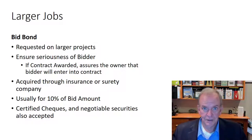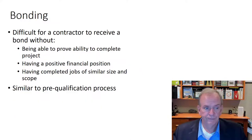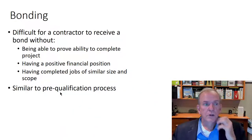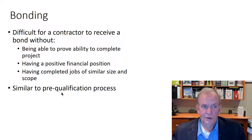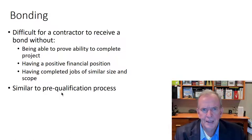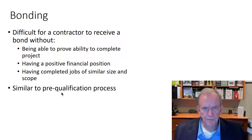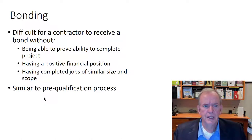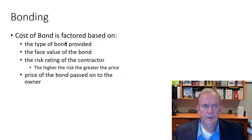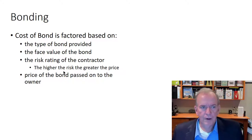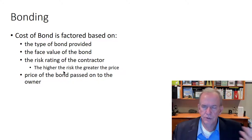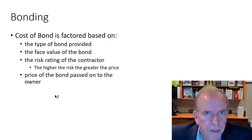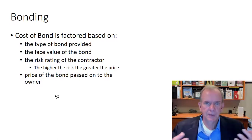You better be serious about your estimates when putting together a bid — you've got your company's reputation and your bonding rating at stake. It's difficult for a contractor to get a bond if they're not in a good financial position, don't have a history of that type or size of project. They always put a limit to how much you can be bidding on depending on your financial stability, so it takes a long road of steps to get up there. And of course there are costs associated with bonds, which you include in your pricing. Most non-government projects aren't necessarily bonded, but it's big in government projects because you have to protect the taxpayers' interests.